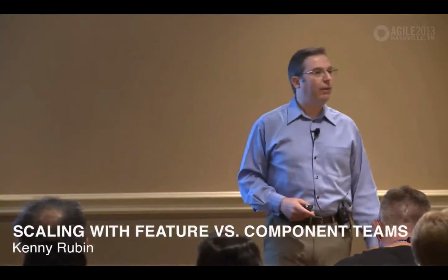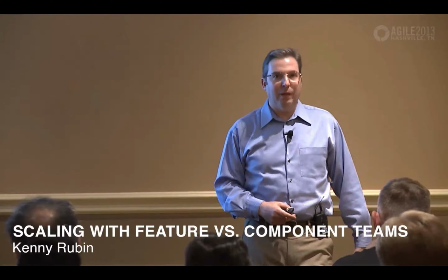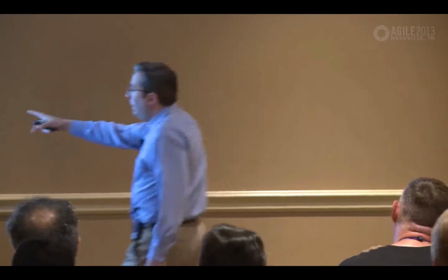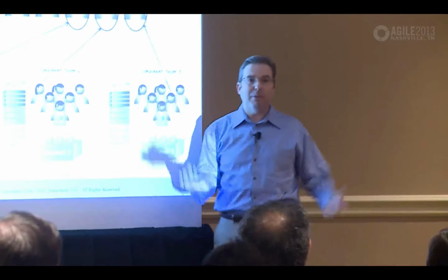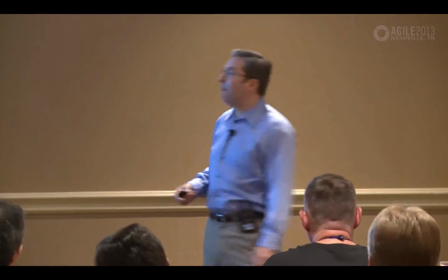So it would break at scale, but you can solve that using the same 2 techniques you always had to solve that problem. 1, don't work on 40 projects at the same time. If you were at my portfolio discussion the other day, you know why that's the right answer. Or hire more people who have knowledge of that area, or some combination of those 2, or get these people to start pollinating these team members so they come up to speed on that area. But you can address that problem. The other model, at scale, you could not. The only solution was drop batons. And that causes economic damage, severe economic damage. So we don't want to do that.